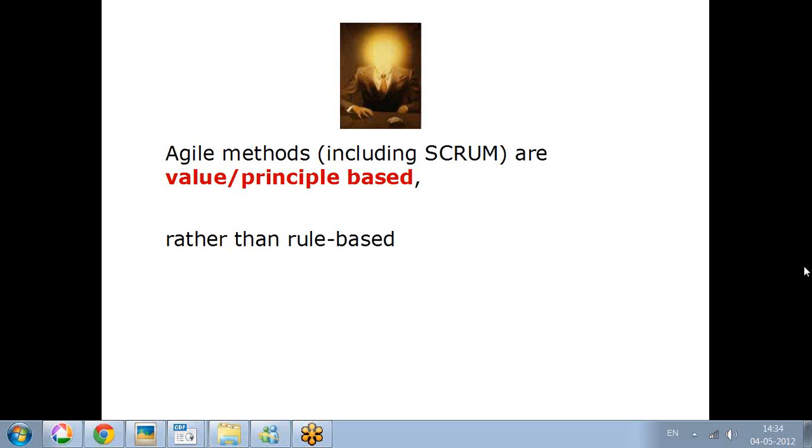If an incompetent team works in Agile, they will fail in the first 30 days, whereas in waterfall, that failure will come out only after 6 months. So here we get more time to recover, whereas that final failure will be catastrophic and the customer will suffer.